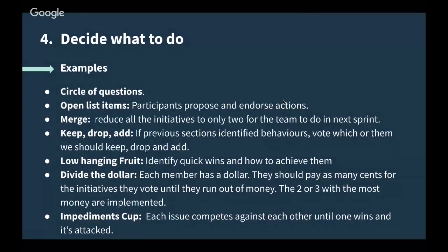If you have a list of actions that could be done, you could have the team vote on the top 3. Everyone gets 3 votes, they vote on the 3 initiatives, and the 3 with the most votes are the ones that get implemented, for example.